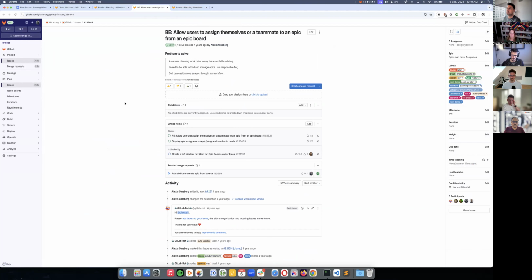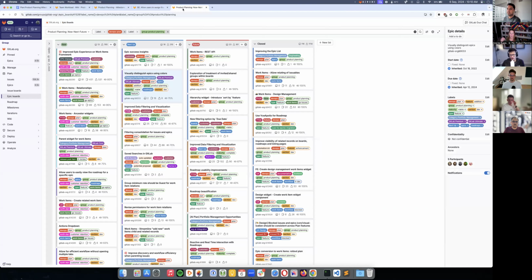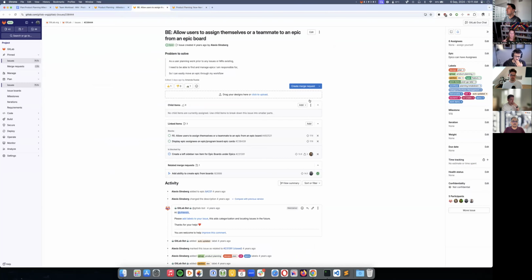Well, this particular issue was just to add assignees to the sidebar. And what I'm hearing is we don't need a backend for that if we instead implement the drawer. Yes, that's correct, and that's okay. In terms of filtering and creating a list, I hadn't planned on that for like 3 milestones. So I wasn't trying to achieve that in this milestone. I was just trying to serve up the back end for whatever we could. Okay. So it sounds like we could remove the back end issue. I could repurpose it for those other things, yep.